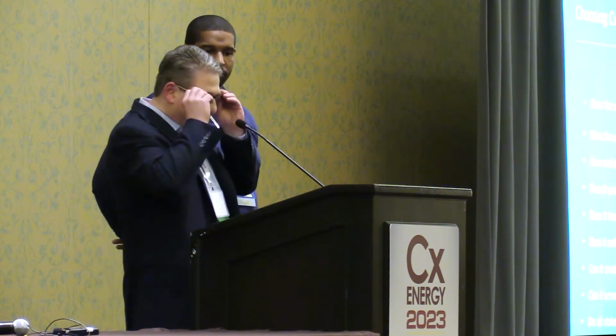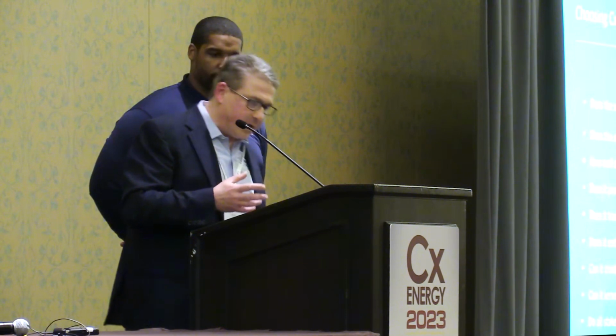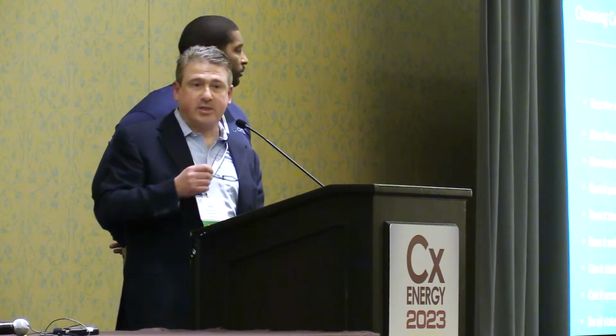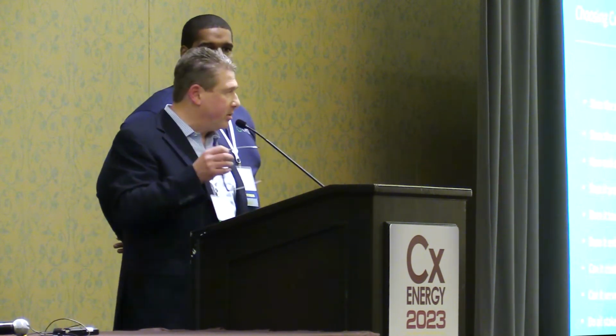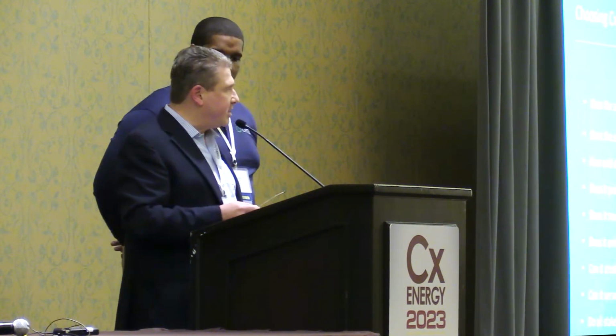What you want to do is start looking at, does the software support your current processes? Does it integrate with the CMMS system? So again, if the client requires you to populate the CMMS system, can the software help you gather all the data that you've entered as you perform the commissioning activities, and then pass it to the owner at the end of the project?